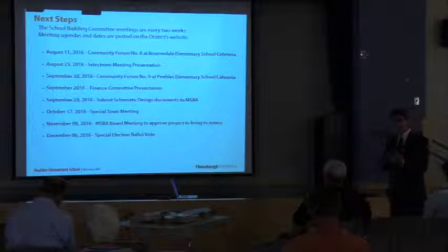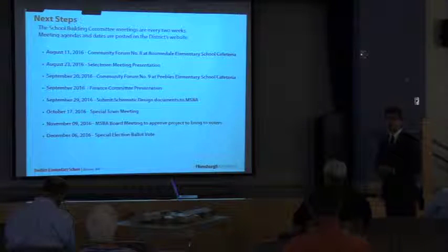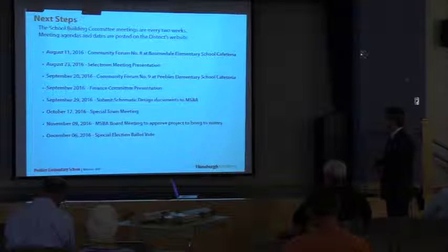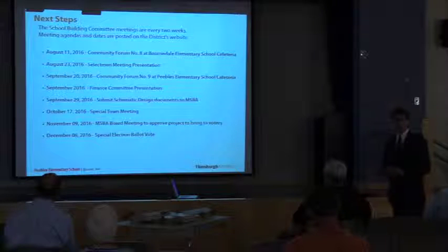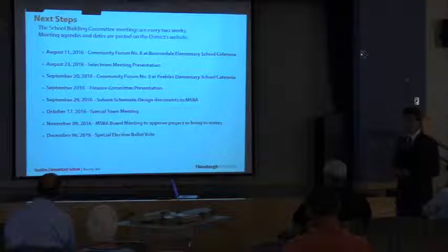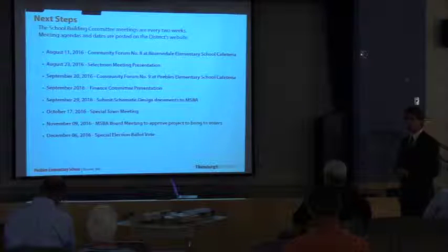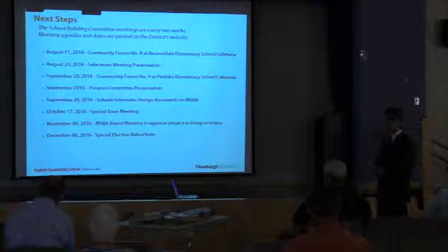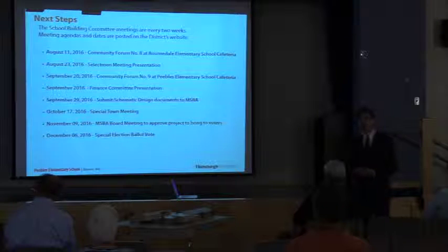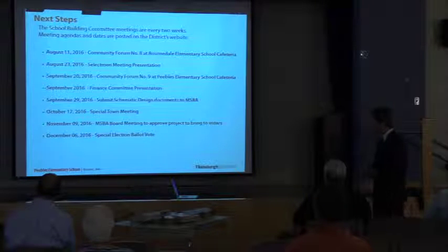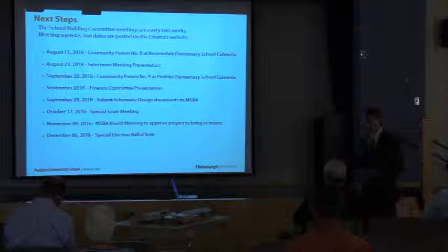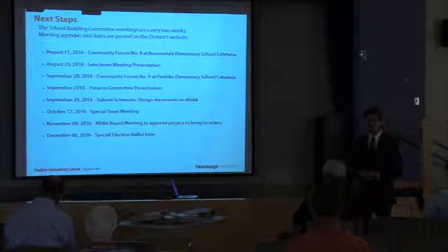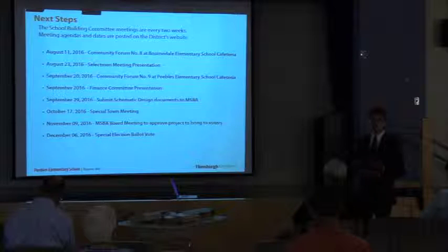In September or October, we're working to schedule a meeting with the Finance Committee and other boards as we go through this process, leading up to the submission to the MSBA on September 29th. We anticipate bringing the project to the voters at the October 17th special town meeting, and having the board of directors provide the overall approval for the project. After that, on their November 9th meeting, we'll then be able to bring it to the voters in a special ballot election vote on December 6th. So all the dates are firming up.